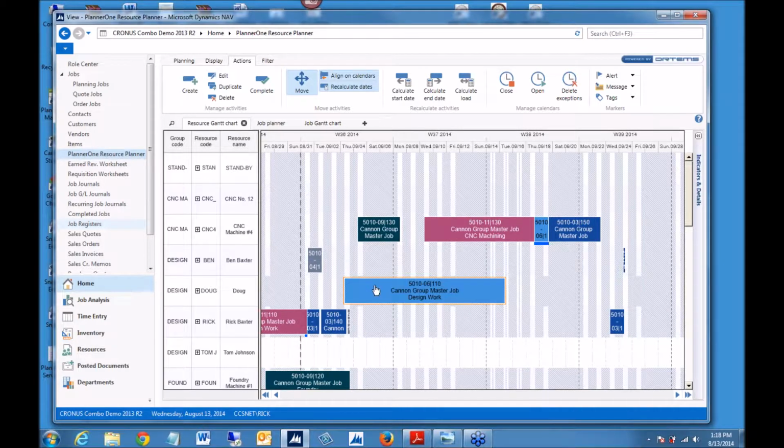So just that quickly it has, and it did expand because probably Doug's calendar has fewer hours or something, and so the length of the sticker determines that. So it looks like it's about the 14th, 15th when that should be completed. The white columns, by the way, are your working periods. Those are the hours. The grayed out area is the non-working periods, like weekends, okay, or night. So it's currently set up for a Monday through Friday, 8 to 5 open period in the shop.